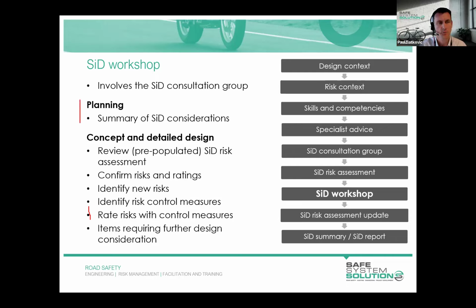Just back up here to the top. If we're in a planning stage project, because of our level of design definition, typically a lot less in a planning project, we'll bring that safety and design consultation group together and identify at a high level some safety and design considerations that will need to be addressed in those later concept and detailed design stages.